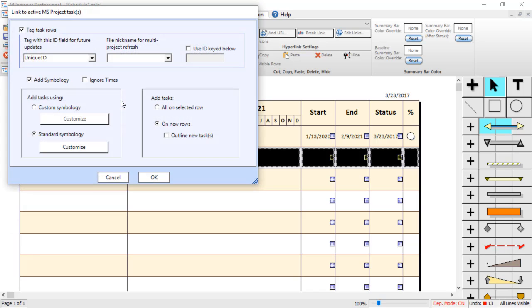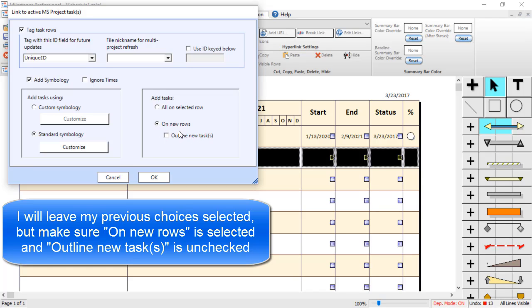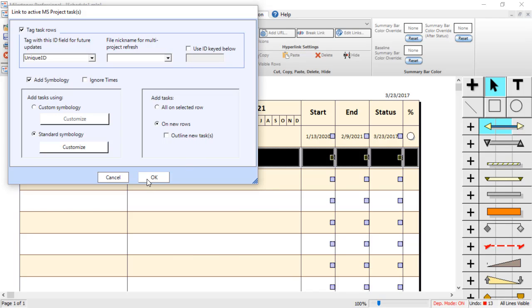And I am going to keep the options the same. So I am going to bring in the same symbology. And I am going to choose On New Rows. And I am not going to outline those new tasks. So I have got On New Rows checked and Outline New Tasks unchecked. And I am going to press OK.